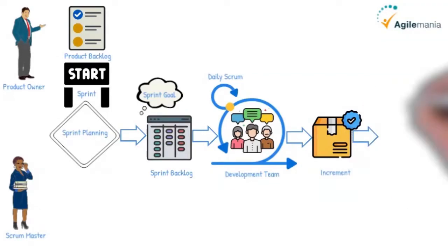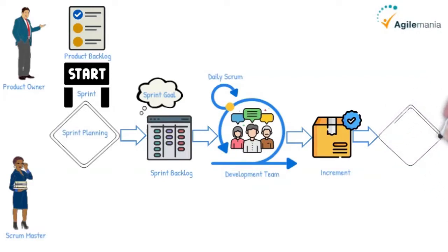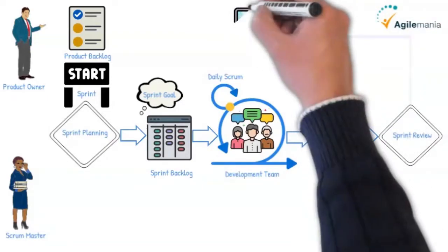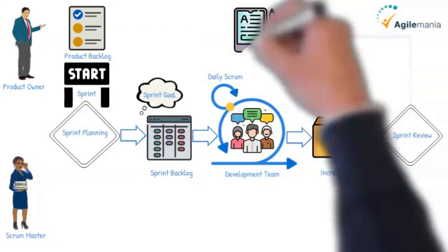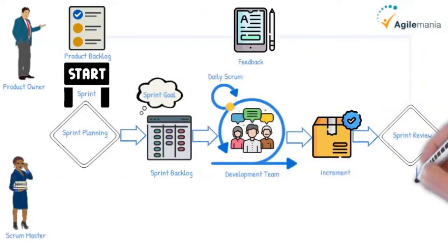The sprint review is an event to inspect the increment and adapt the product roadmap. It is important to have stakeholders during the review as they provide feedback and business insights. Based on the feedback, the product backlog may change for the remaining work.